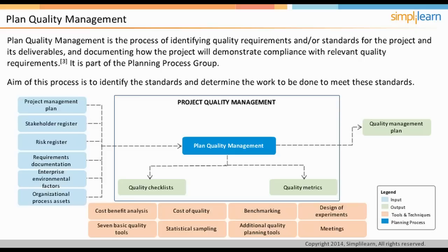One of the roles of the project manager is to not only manage the project, but also improve processes in the project to decrease the instances of defects, which in turn saves time and money. Such activities are listed in the Process Improvement Plan, which eventually becomes part of Project Management Plan. As a result of the planning activities, other project documents may also get updated. For example, the Quality Management Plan may result in updates to the cost or resource requirements.